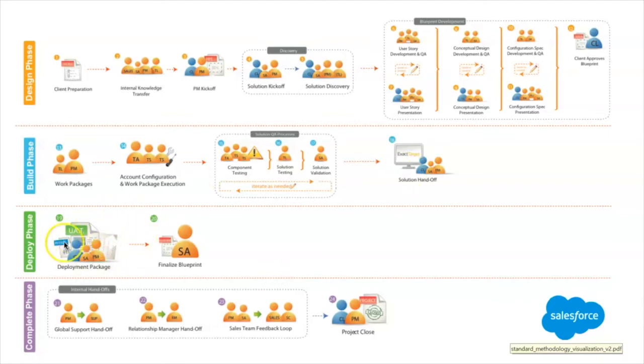Before this, then the user acceptance test is done, where the end users test the solution which has been built, and based on their approval or change request, the final solution is defined. This final solution is then defined and recorded into the final blueprint document. So here the initial requirement is captured, and then after the building of the solution and deploying it after the UAT, the document is updated with the final solution.